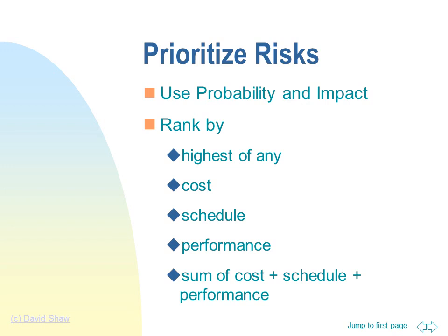After merging risks, we can prioritize them using probability and impact. There are several ways you can rank them. Some common ways are ranking them by raw PI scores. I will explain PI scores in a moment. Or you might want to rank them within cost, schedule, or performance, or as a combined score.